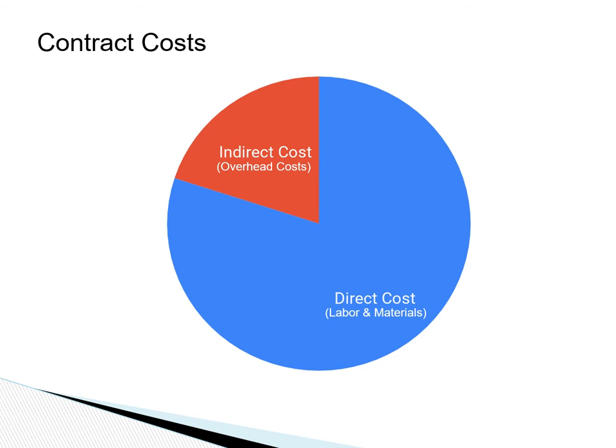When we discuss contract costs, we have to keep in mind that the majority of the cost is direct costs, such as the cost of labor or material. However, there is also an indirect cost associated with management and support indirectly provided to the project. For example, the cost associated with payroll or office space for the contractor project team would be an example of an indirect cost.